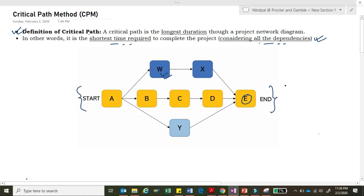Why is the critical path called critical? Because whenever there is any delay in an activity on the critical path, the project gets delayed. So as a good project manager, you always need to pay attention to the activities on the critical path — A, B, C, D, and E — because if any of those activities gets delayed, your whole project gets delayed. That is why critical path analysis is very important.